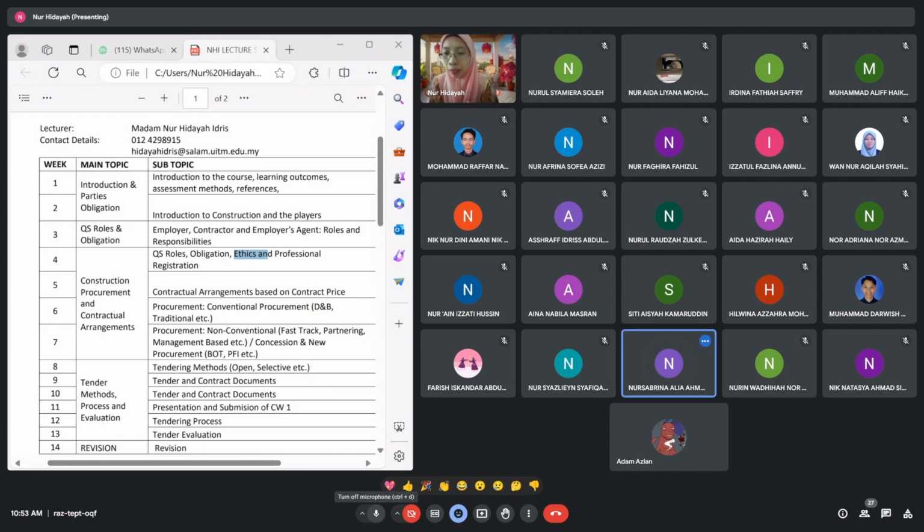Beam, in which element is there a beam? Frame. Okay, ground floor has it, in work below. And then the upper beam, upper floor also has concrete, right? Other than that, where else is concrete used? Foundation. Okay, pad foundation, right? Pile cap, right? Piling. Okay, look. Concrete works are scattered all over the places in elemental BQ.